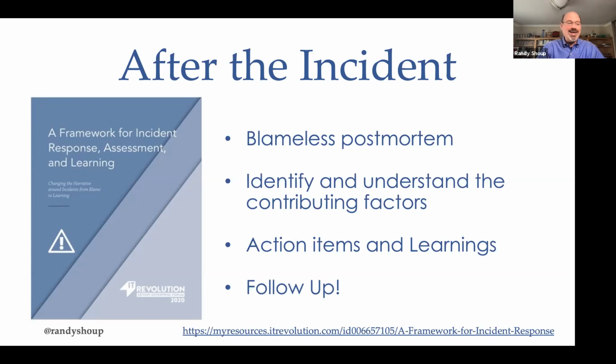And I can't emphasize this enough as an engineering leader, you want to follow up. It's great for us to say in our postmortem write-up, oh, we should do this, we should do this. But those things need to be actionable. So I don't want to see things like "we should be more careful" or "we should test more." Instead, we need something actually actionable, that you could put in your tracking system, in your Jira, or whatever you use to track your work.